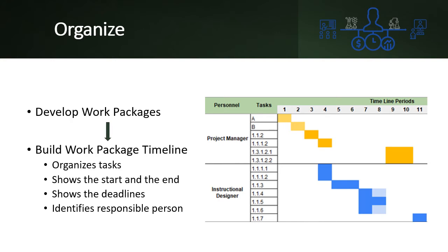With the next step, the project manager and the functional managers will break down the activities into work packages and assign them to team members. For example, the work packages for the instructional designer will include such tasks as interview content experts, develop structure of materials, and develop content for each unit. The work package assignments will provide team members with definite beginning and ending tasks for each assignment.